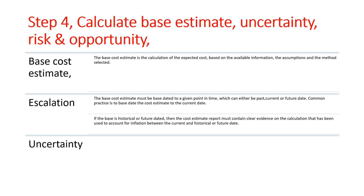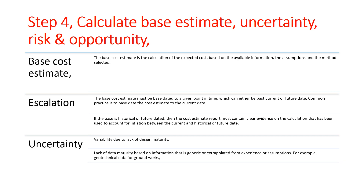Uncertainty is driven by three factors. Variability: variability due to lack of design maturity or lack of data maturity based on information that is generic or extrapolated from experience or assumptions — for example, geotechnical data for groundworks. Bias or Error: conscious or unconscious assumptions that lean towards values that are not accurate.